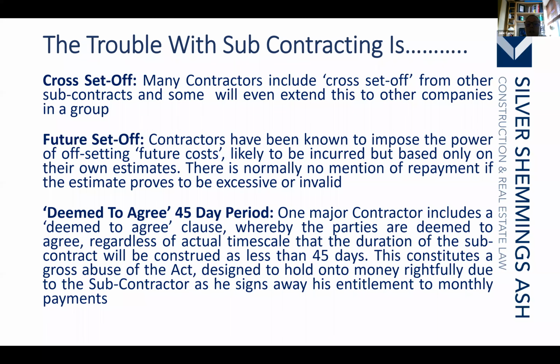Okay. Another question here is, how can adjudication be handled in a subcontract when the alleged breach also affects the parties to the main contract? Some contracts have a joining provision that says that where the main contractor is entering into a dispute with the employer and it affects the subcontractor, the subcontractor can be joined into the same dispute. So in other words, there'll be a three-party dispute. It can also work the other way, where the contract says that where the subcontractor is in dispute with the main contractor, it can then bring in the employer, so the three parties are going to be in one dispute. But that is very uncommon.